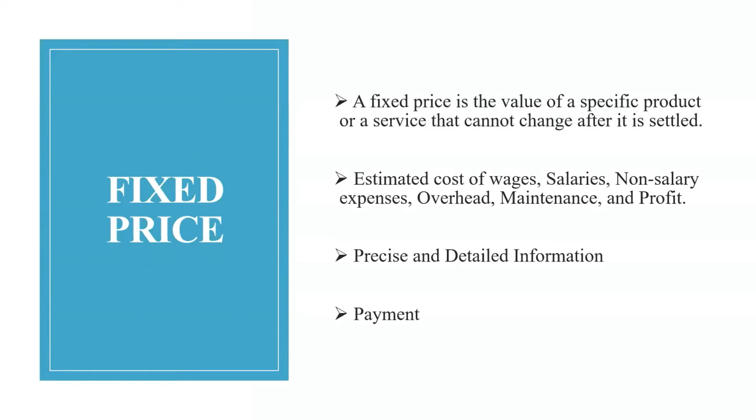Fixed fee. A fixed price is the value of a specific product or service that cannot change after it is settled. The price of the goods and services is kept constant regardless of the production cost. This method is used when the client has been presented with the project's nature, specification, and scope.